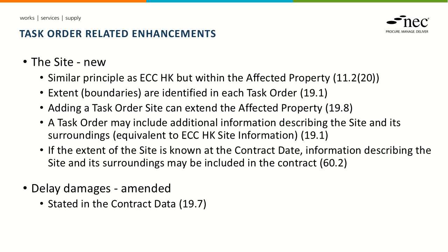So in thinking about that, we've created the concept of having a task order site. And the task order site sits within the affected property. And whenever we issue a task order, as part of that task order, we define the extent or the boundaries of the task order site. There is flexibility in that if the site is outside of the affected property, we can extend the affected property to include the task order site.